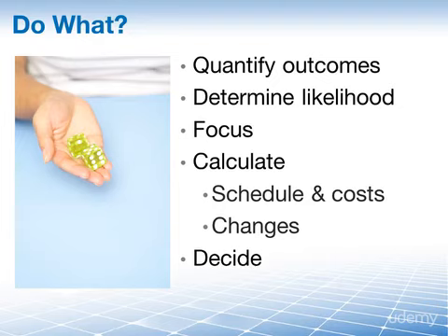You know that the weather might be bad in December, but by having it quantified, the report informs you that it is 80% likely for the ground to be frozen during that time and your cost could be 40,000 euros in lost time. Now you can make decisions based on numbers.